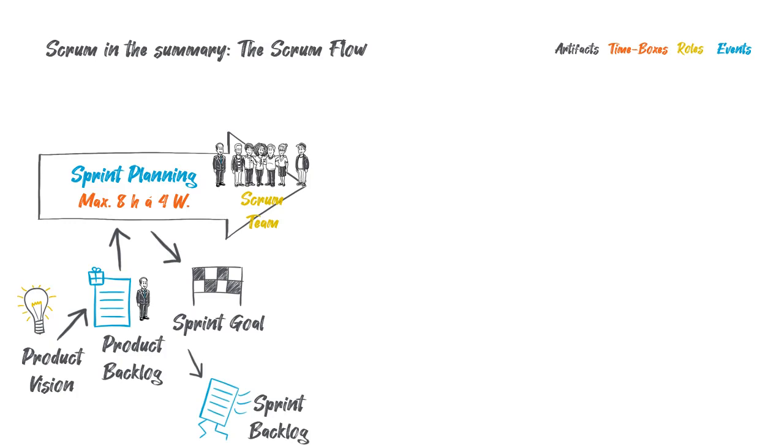The requirements from the product backlog, including the sequence of events, are entered into this backlog, and a plan specifying how the development team wants to achieve the sprint goal. The requirements are supplemented by tasks. Only the development team takes care of the sprint backlog management. Once this work is done or the time box is over, the development team starts working, that is, implementing the plan. This is what the circular arrow in the middle stands for.